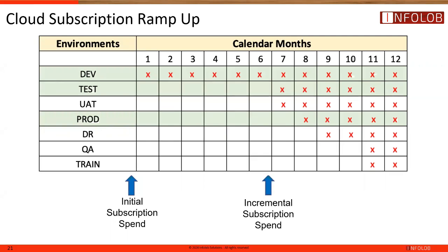Yeah. So again, this goes back to the project planning. Some customers will have 2 or 3 environments. Some may have more or want to add more during the project. So typically what we see is the dev cycle that goes through setting up the tenancy, setting up the initial infrastructure within the tenancy, and adding a dev environment. That could be from 2 months to 6 months, depending on the cycle with the customer and the complexity.